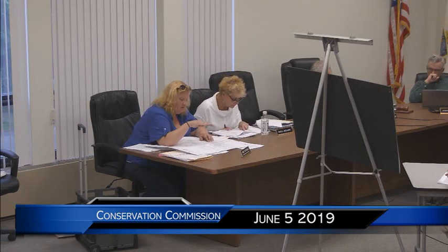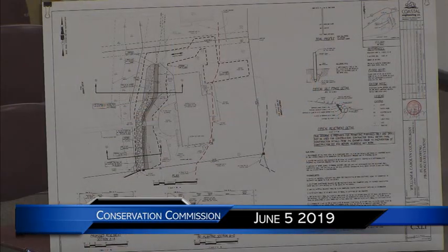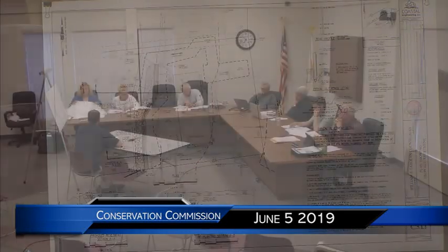So as it goes into the grade, is it still gonna be the same height, or can you taper it to basically toe stones once you get in there? I believe it'll be tapered as it starts to go into the grade. Again, it's going to be kind of somewhat however many stones are on the vertical face of the wall is going to be kind of field adjusted as it goes. And the northern line will show where, no matter how many stones are on the face, that's where the wall will end. Yep. And where it breaks into the grade completely is going to somewhat vary on the field conditions and exactly how it's regraded as well.